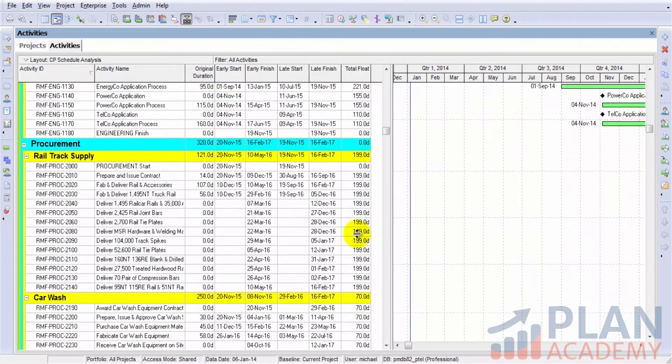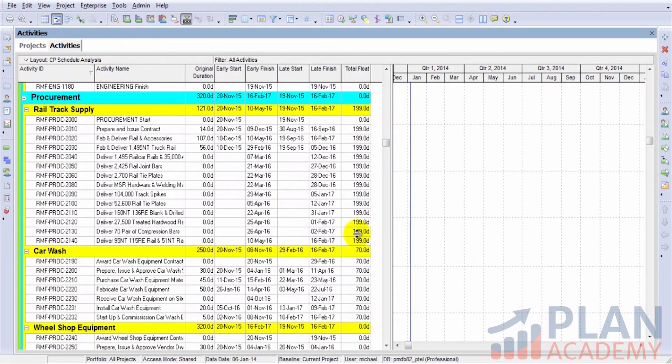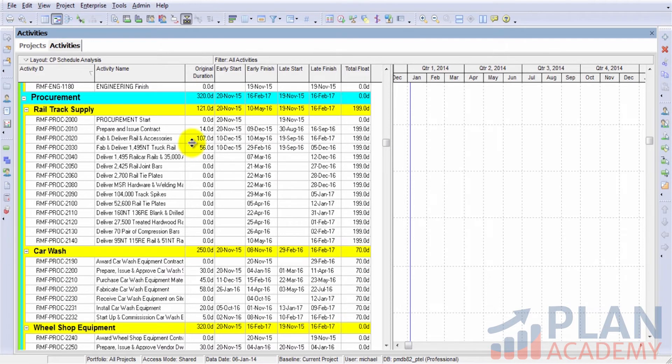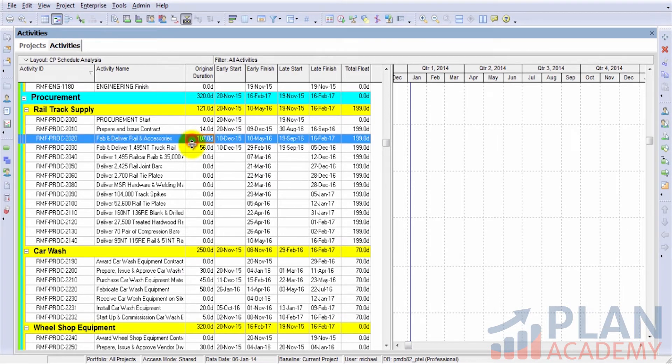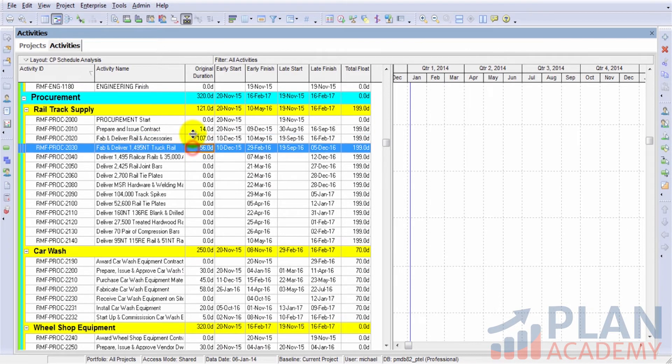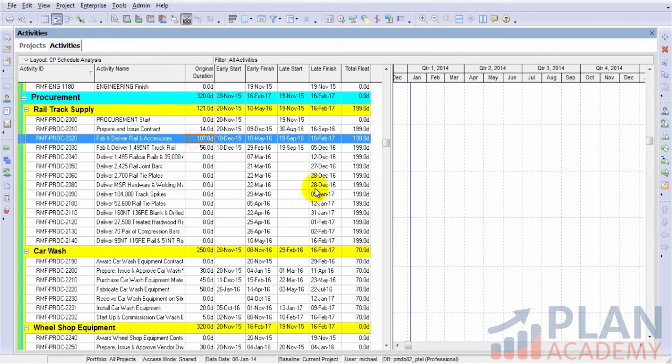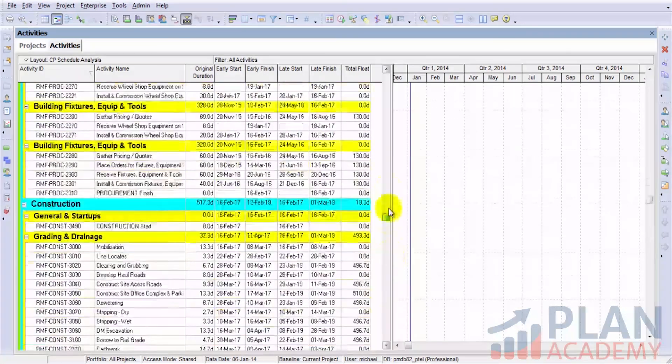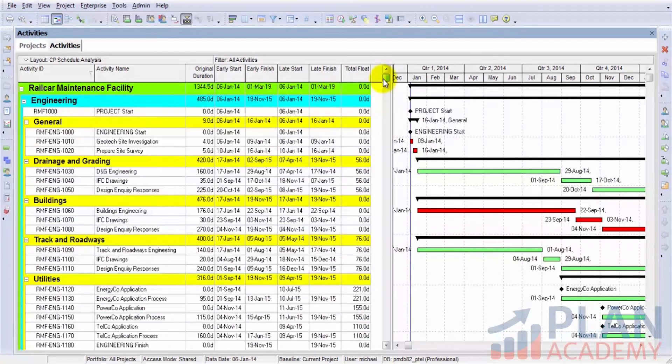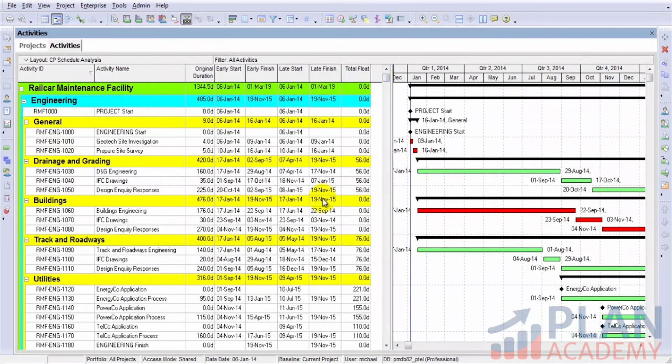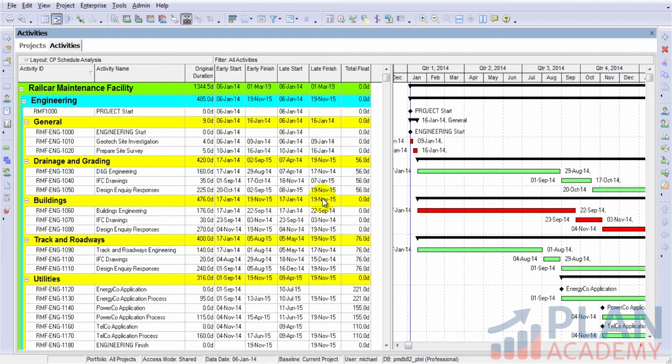And you can see that because this is a large project with large long activities, like many are somewhere in the hundreds of days, we have large total float values as well. Let's look at a very handy tool that can help us do some schedule analysis.